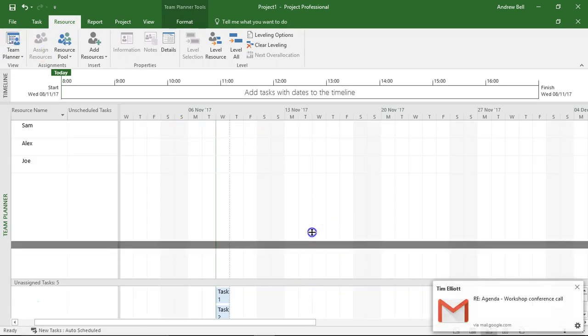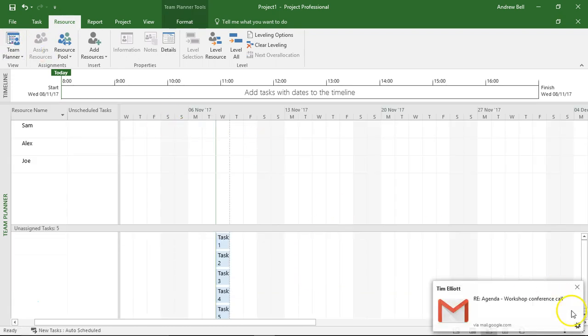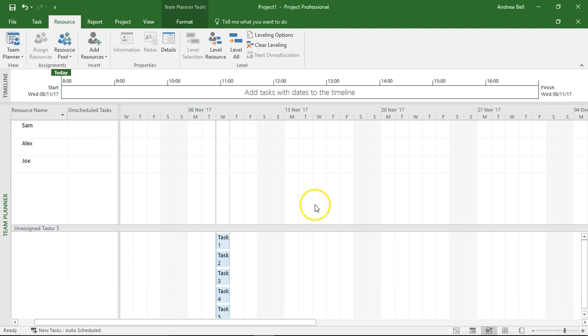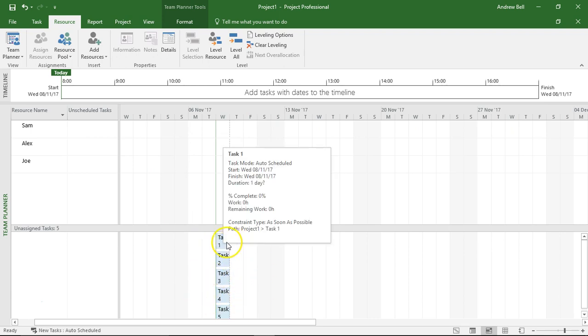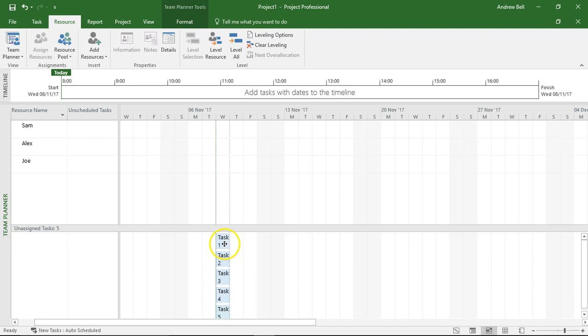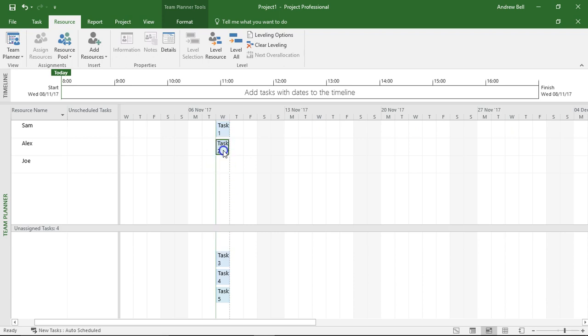Now there are four areas in the Team Planner: we have the resources and we have the tasks, we have the unassigned tasks down here. So what I can do is I can drag task 1 and assign it to Sam, and I can drag task 2 and assign it to Alex, and I can say task 3 is going to happen here on the Friday with Sam.